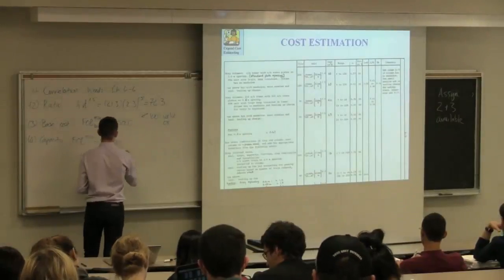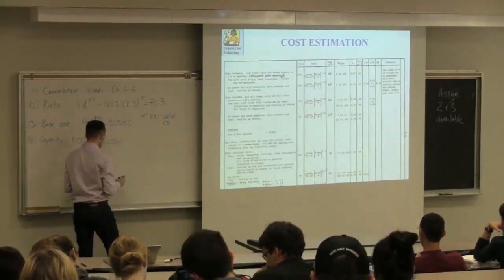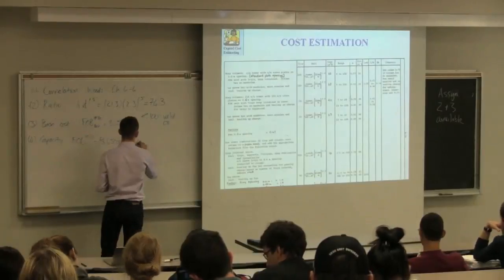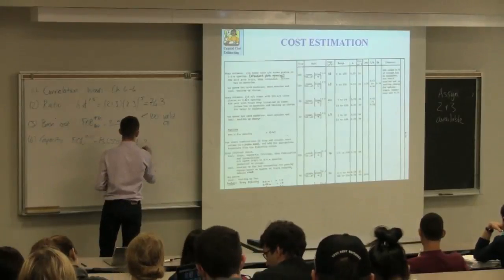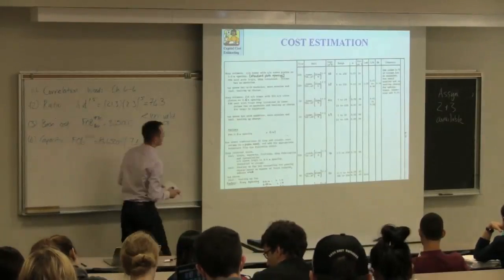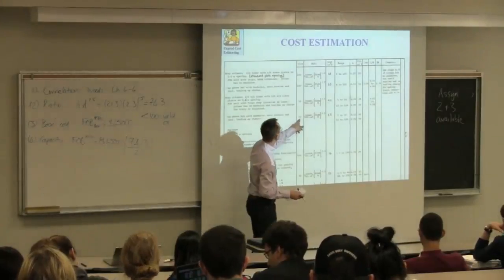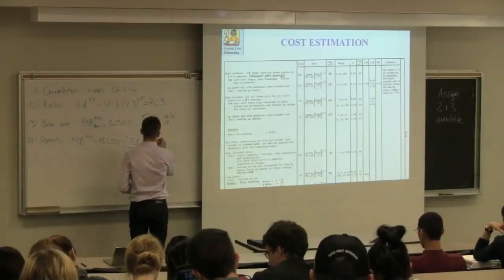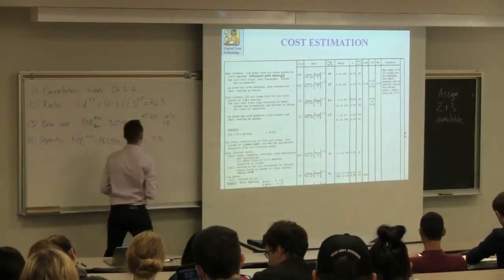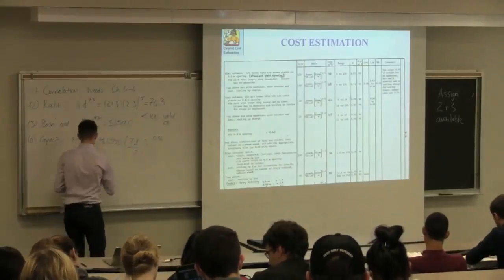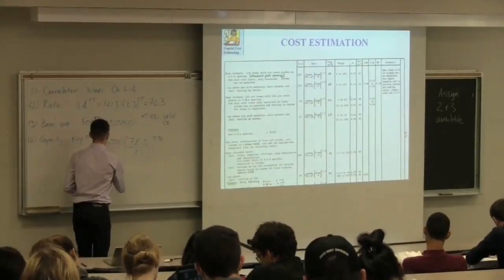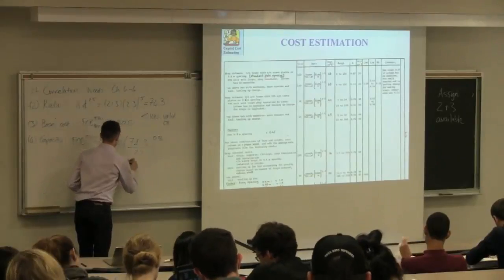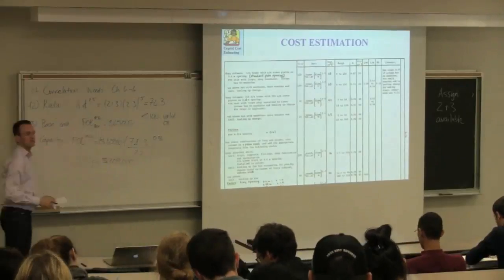65,000 multiplied by the capacity factor, which in this case is 74.3 divided by 22. So the base tower is spec for 22 for that product, for that sizing factor, we raise it to a power of 0.96. So that would get us a cost of 209,000 in 1970.